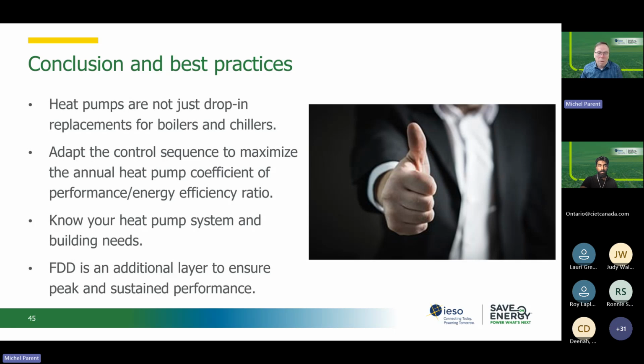So it can be beneficial in helping catch some of the commissioning mishaps that happen with new equipment. So it's still beneficial for new equipment, but if you've got old equipment, you are obviously going to get a lot more diagnostics of possible failure. But because of commissioning issues and how commissioning sometimes is skipped, the FDD can be beneficial even for new equipment.